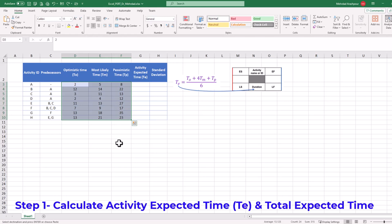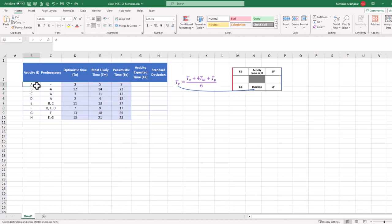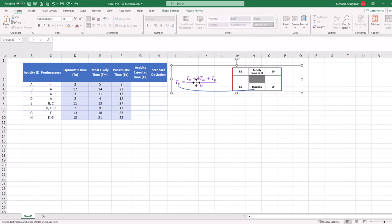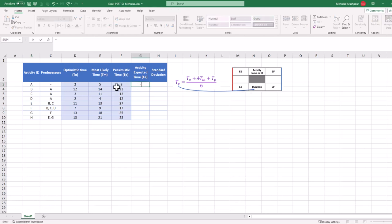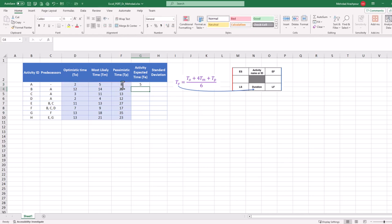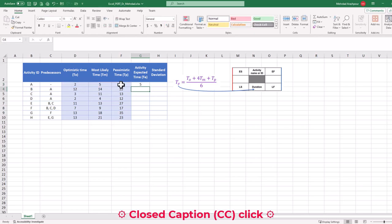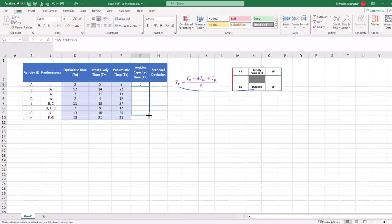Step 1 is to calculate activity expected times, or TE, and total expected time for our project. We start with activity A to find its expected time or TE using this formula. First, we click on the relevant cell and press the equal sign. Then in parentheses, we add optimistic time plus 4 times most likely time plus pessimistic time. Finally, the sum is divided by 6 to find the expected time for activity A.